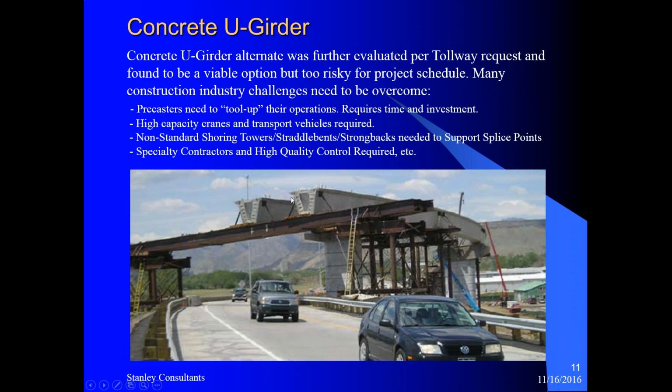Basically, a piece of the section is completed by an in-field pour, and then they are post-tensioned, so it requires specialty contractors and high quality control. So based on all these things, a detailed investigation was conducted, and then it was found